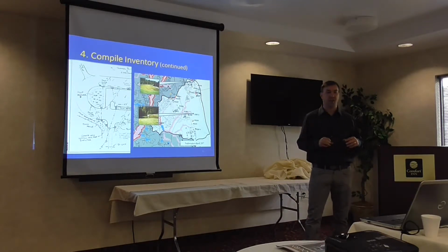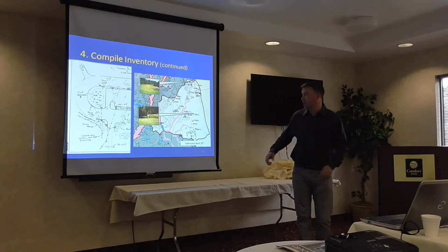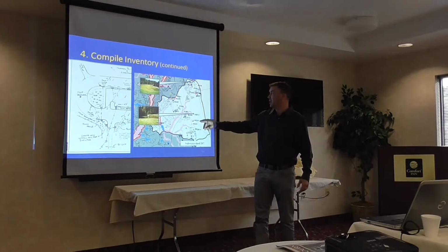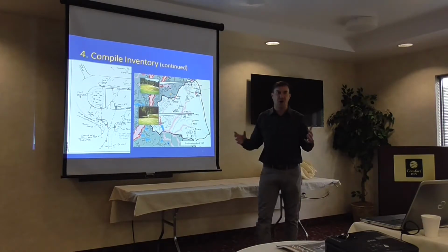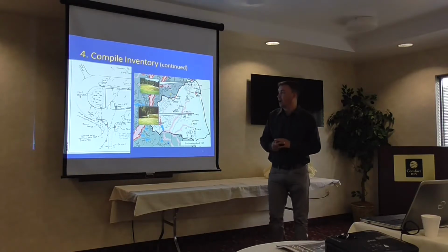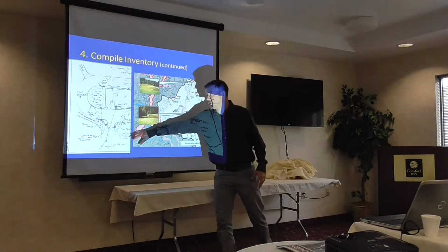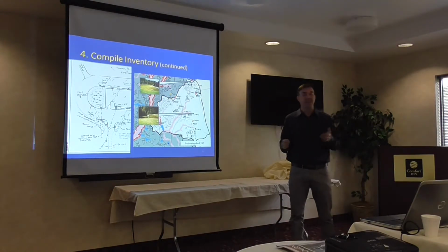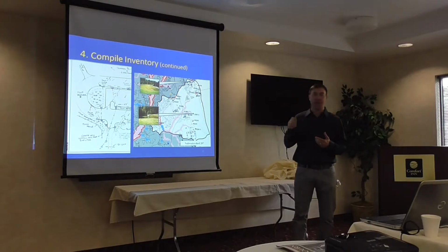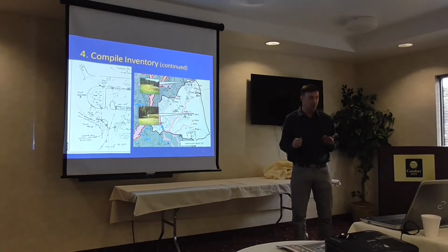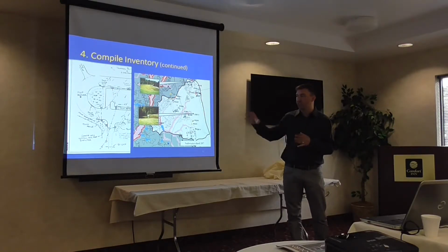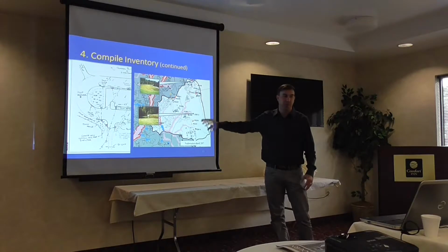So you'll compile this, you'll end up with a map, hopefully, that indicates where they are with some photos of each site. Each site might be coded. Coming up with your own coding system is fine, whatever makes sense, so that you can track what the projects are, and then you'll have a sketch in there as to what you're proposing. It's usually a sketch you do. What I usually do is I create a decent sketch in the field, and then I come back into the office later when I'm not standing out in the cold and rain, and I clean the sketch up a little bit, especially for those that look particularly like they might be helpful. But you'll have a sketch, you'll have a completed field form, and you'll start to build up this map.